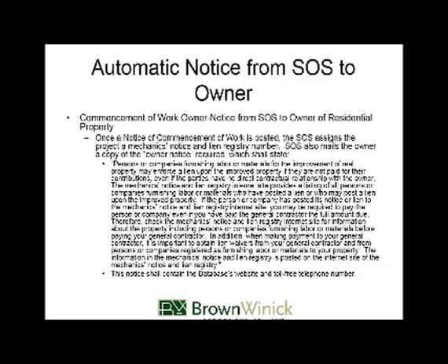In addition, when making payment to your general contractor, it's important to obtain lien waivers from your general contractor and from persons or companies registered as furnishing labor or materials to your property. The information in the Mechanics Notice and Lien Registry is posted on the internet site of the Mechanics Notice and Lien Registry. The notice by rule was also required to list the website and toll-free phone number.